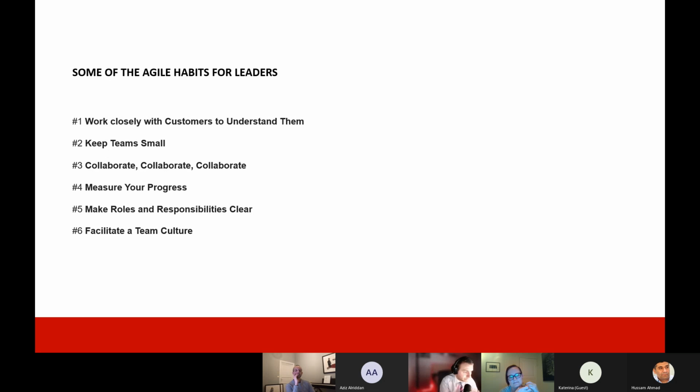And what I have implemented is, every kvartal, I'm not sure what is in English. Quarter. Every quarter, I have a stakeholder meeting where I focus on exactly just one thing, and that is the samarbeid factor, where I just gather everybody. I show them, okay, this is what I have planned, or you have all given me orders on, and now we're going through it together, and you can fight, you can do politics, everything, but just talk about my topic, my field.